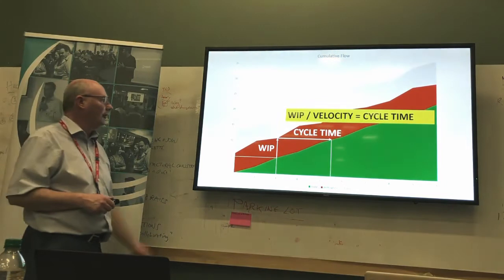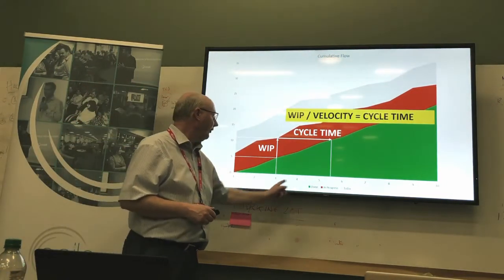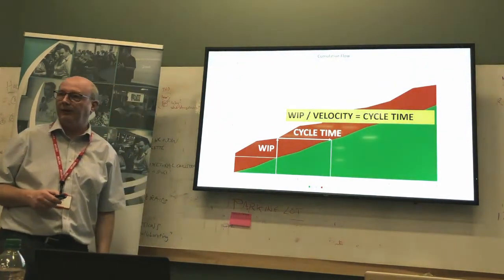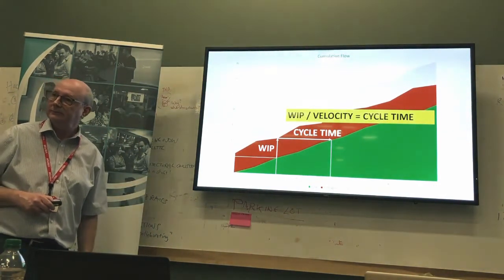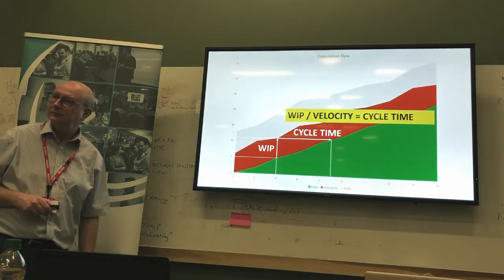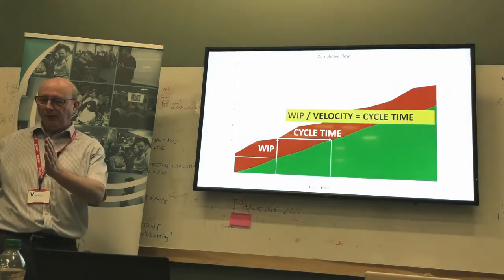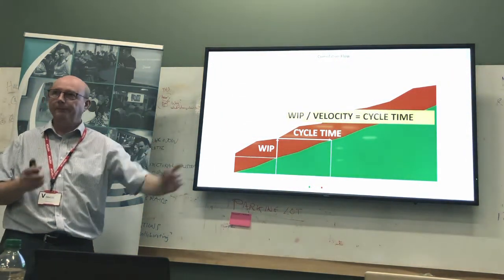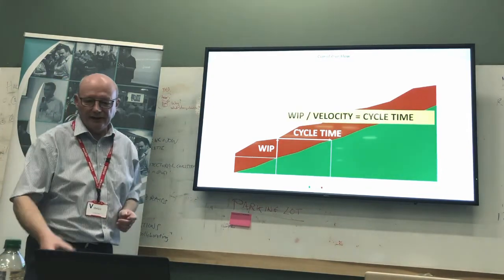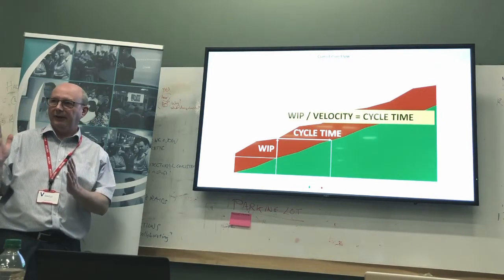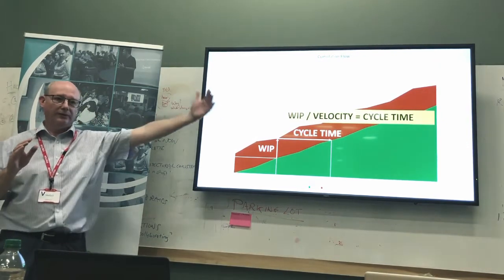If your cycle time is 2.5 days, it's probably going to be on average 1.25 days before you can pick it up. Just a quick point: does it mean you assume that you already have the ticket in iteration, because normally that's the lead time until I ask you to do something? Yes. Okay, so cycle time we are measuring going from to do across the board to done. Lead time is really measuring from when we say, yes, we will commit to doing this, to delivery.